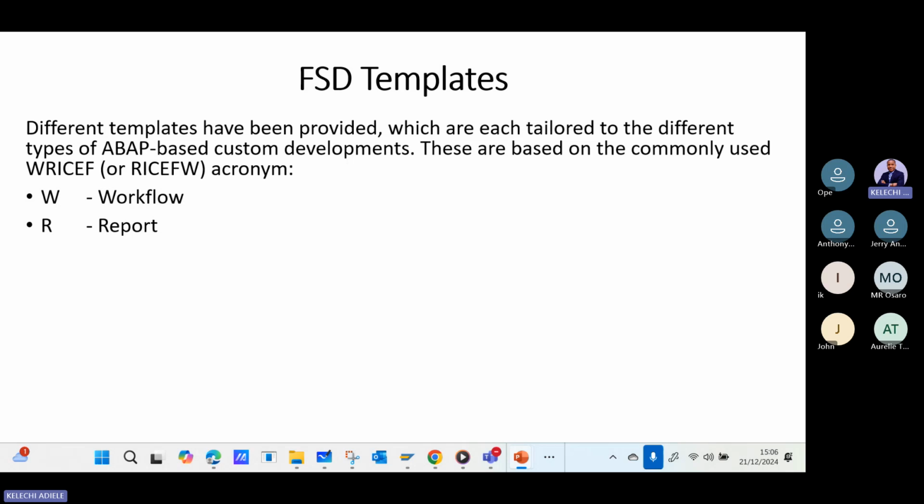So reports are also a gap you find most likely in projects, because these are specific requirements and sometimes specific to a country. To close gaps that are report related, you have to customize reports. So as a BA, you have to identify what those reports are, the format they will be in, and get sample documents. You also have to liaise with the functional consultant and technical consultant, and most times you might have to come up with an FSD to close that gap.